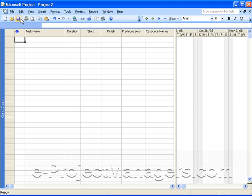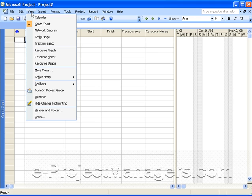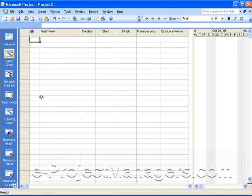By the way, when you open Microsoft Project, if you don't see the view bar on your left-hand side, you can always go to your menu option view and select view bar, and then you'll see the different views that are available.